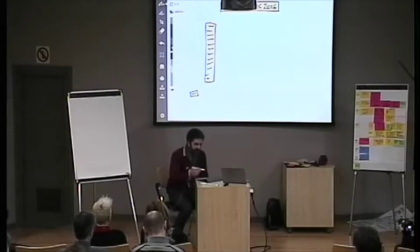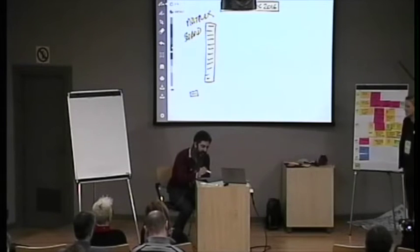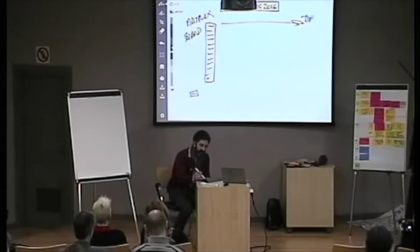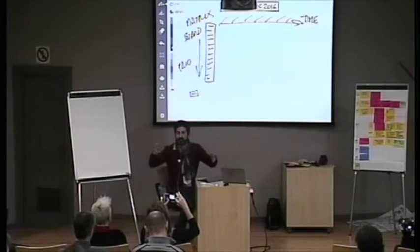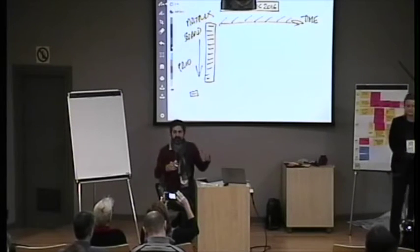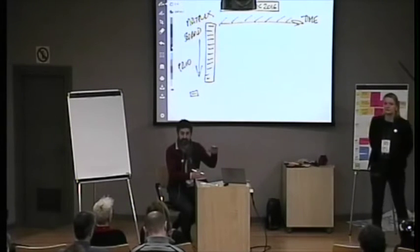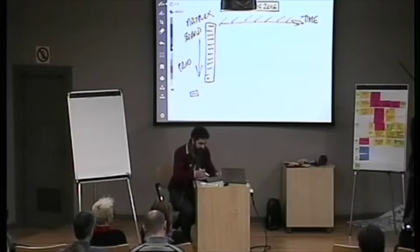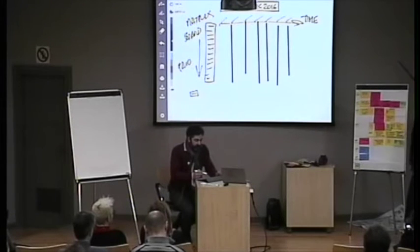This is the first pattern we have discovered, and we're calling it the matrix board. It's a task board that looks like a matrix. On one axis you have time, and on the other axis you have business value or priorities. You're going to visualize the timeframe you need to plan for — it could be purely calendar-based such as a quarter, or it could be a release. If you're working in a factory, there's a moment when the factory is halted for a summer shutdown, and that's a natural end of the release for them — a deadline to have things ready to implement.